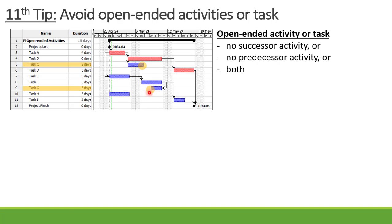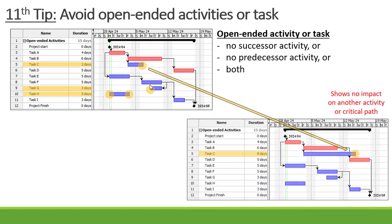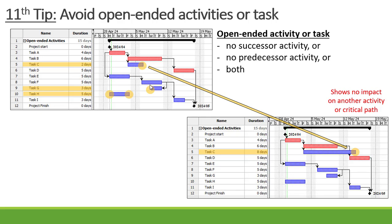Task G doesn't have a predecessor activity. Or it can be an activity like Task H with no predecessor or successor linked to it. So what happens if we delay an open-ended activity? If Task C is delayed, it actually shows that there's no impact on another activity or even on your critical path, which is in actual fact incorrect.